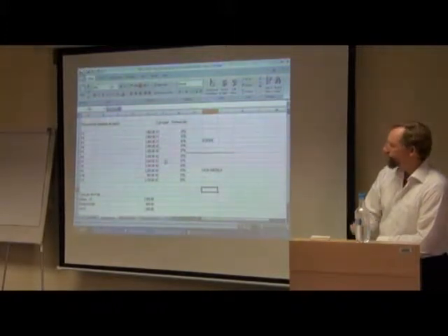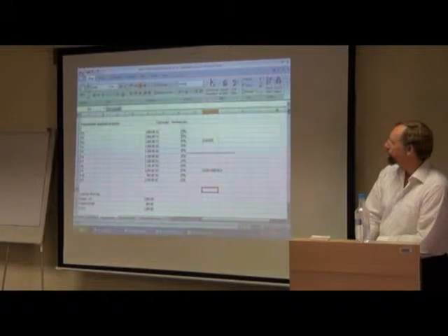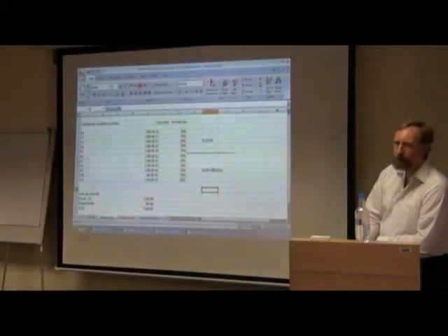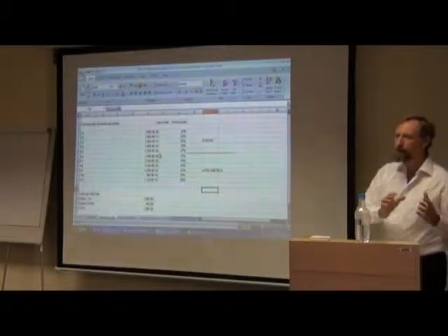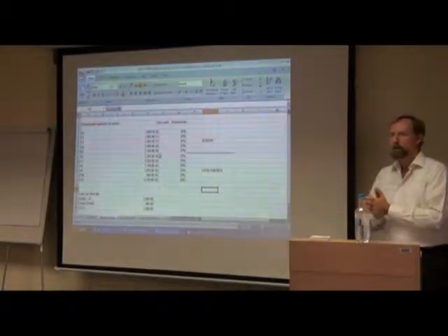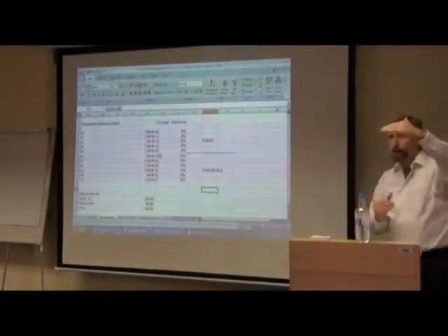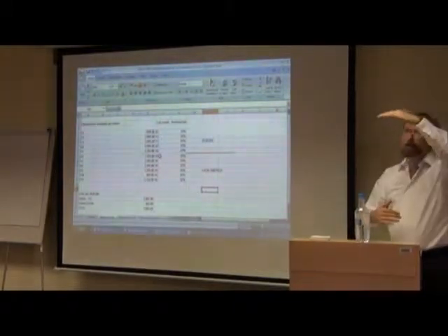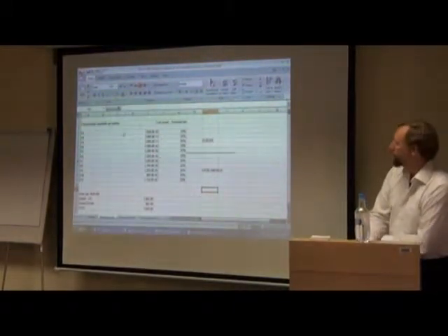And this is something that relates to FP6, so I will explain later. And that is the actual overhead rate they use. You see that the salary levels here in this Latin American project are far lower than the ones in Europe. So each partner has their own average salary cost. If you have senior personnel and junior personnel, you split the two.